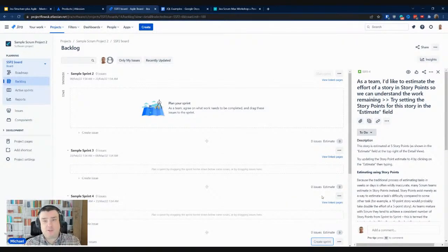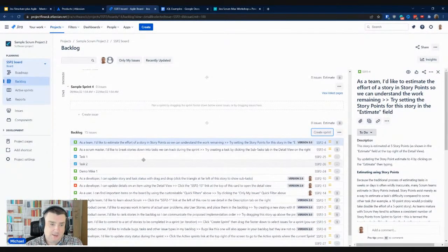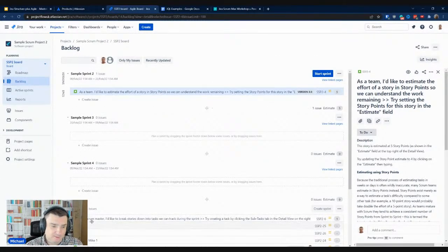Why? Because of course planning a sprint the first time is going to be a little bit difficult. You need to know the team velocity, stuff like this. However, the second sprint, third sprint is going to be much easier. So I know at the moment my priority, that's why I put those issues on top, is going to land into my first sprint, and this is a very simple process.